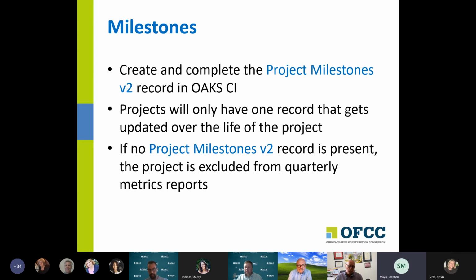And Sylvia is correct. The basic rule, and then we'll move back to the topic that we're talking about here: when any record gets created, any auto populations from project information occur at creation, and Unifier never updates those. So if a record already existed and had Jenny Hildebrandt on it, there's no good way to change it on that record.